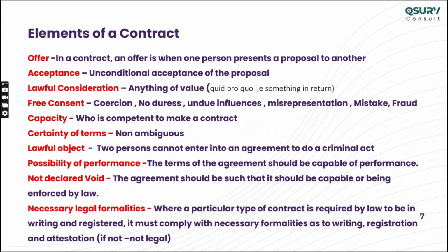The counter offer I already explained: an offer against an offer. There is something called a standing offer or continuous offer. An example is a tender, because you are giving an offer and keeping it open for a period of time. You say this is the specification and drawings, and I want you to give me an offer or acceptance within 3 months or 2 months, whatever. That's called a standing offer or a continuous offer.